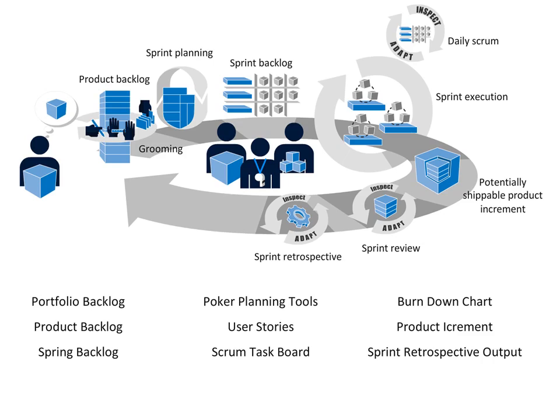So one of the highest level would be the product portfolio backlog. So if you're thinking in terms of, for example, Microsoft Office, the whole suite is a portfolio backlog, while the product backlog would be the feature list for, let's say, Word as a software. And once the team picks up prioritized features, they create the sprint backlog.